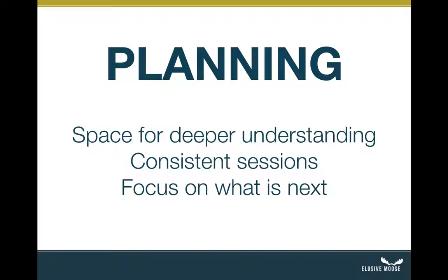Is this where you also introduce the concept of regularly scheduled meetings? Yeah, actually, during the kickoff is where I would introduce that concept and say, this project is estimated at X number of development hours, and therefore we're going to break that down into X number of iterations. So let's go ahead and schedule those meetings now. Let's get those on the books, so that we don't have to argue about trying to find a time to meet during the project. But the planning is that sort of continued deep understanding. How do I do it? When do I do it? That's the process that I would be explaining to the customer.